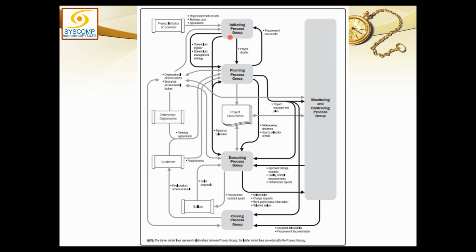The project charter is an authorization by the project sponsor to the project manager. That means this is an order given by the project sponsor to the project manager. How can you write an order for yourself? You can assist in writing that, but you can't be the author of that document. Yes, you can be the receiver of that document. Once the project manager receives that charter, he looks around. The first thing he needs to note is who all are the stakeholders I would have to deal with.